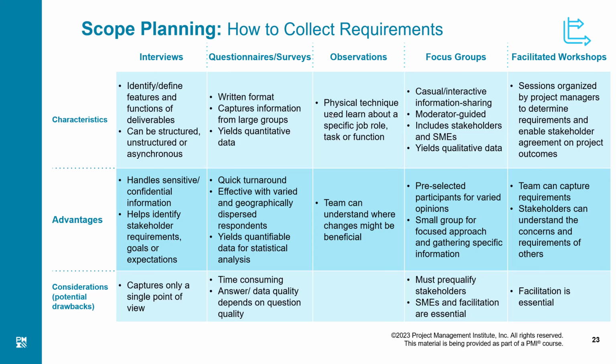Okay, when all of this is not possible, then we will have to resort to remotely collecting data from a larger audience spread globally. All the stakeholders who are not present here, how can we get their opinion? That is through questionnaires and surveys. These are written formats. They are sent out. They are very carefully designed questionnaires because we can't have open-ended questions here. Because if we get open-ended questions answered by 2 million people, it is probably not possible to even read all those opinions.